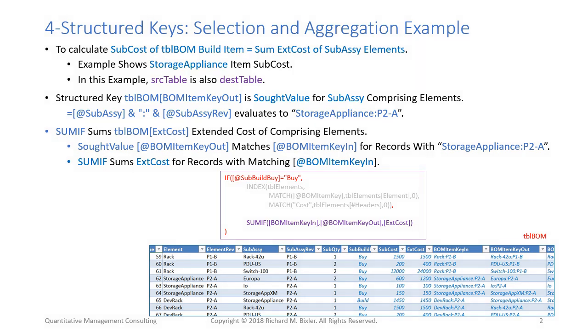So each element is broken down into several records, one for each subassembly needed for the element. Each record then describes one of the subassemblies, including subquantity needed, whether to build it or buy it, and lists the cost of the needed subassembly and the total cost of the needed quantity of that subassembly for that element.